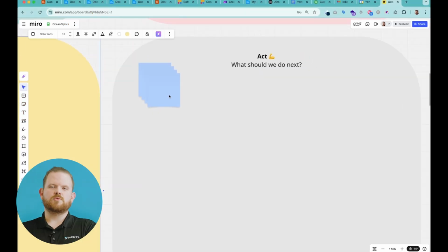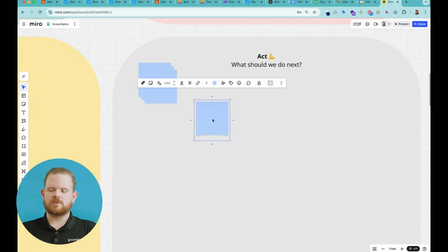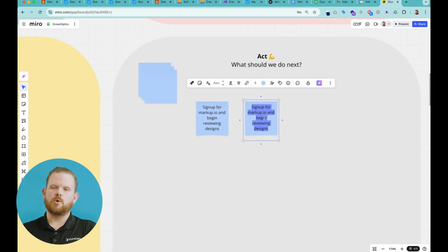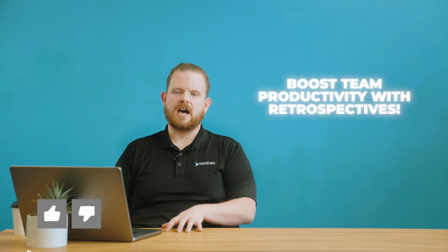And then finally, on the right quadrant, this is where the action steps are listed out. The team lists out their action steps on what they're going to actually do moving into the next sprint. And it's very important that you take those steps and either document them somewhere or load them into your project management tool and assign them out to the team members so that actionable steps and actions actually happen, and it's not just a conversation. You actually get proven value out of this meeting.